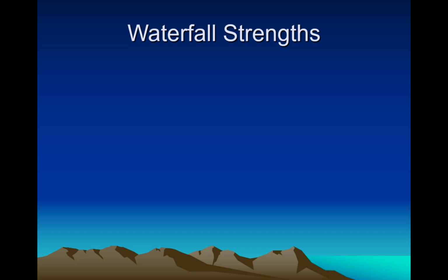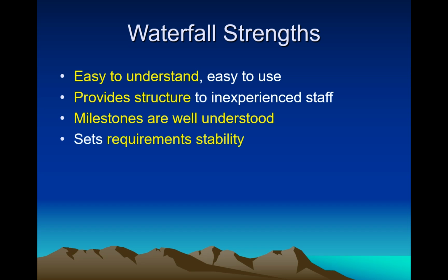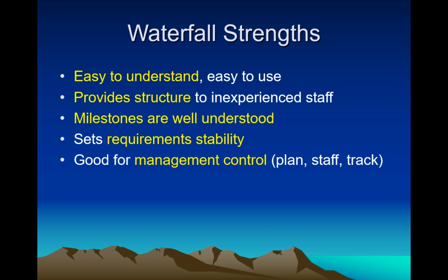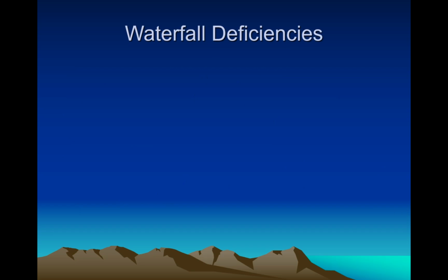Okay, so let us discuss also about what are the strengths of using waterfall model in software development. Number 1, easy to understand in use. Number 2, provide structure to inexperienced staff. 3. Milestones are well understood. 4. Set requirements stability. 5. Good for management control, plan, staff, track. And then for 6, we have here works well when quality is more important than cost or schedule.